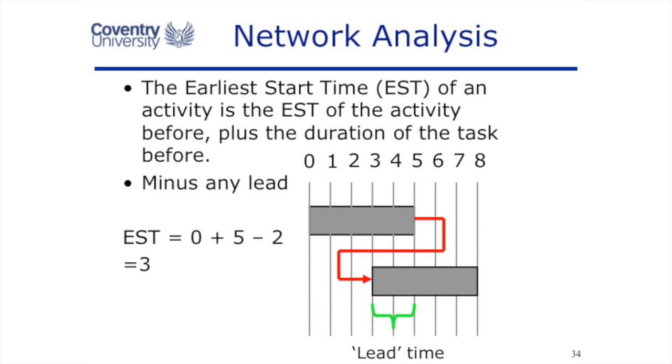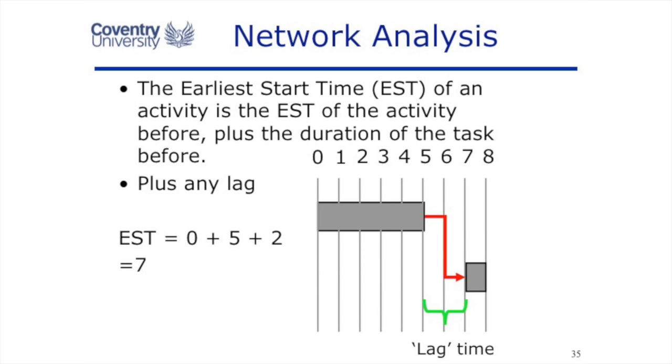However, when we do this, we have to remember that we have to subtract any lead time because the second task can start before the first task is finished, or we need to add any lag time. So the early starting time of an activity is the early starting time of the activity before it plus the duration of the activity before it plus any lag or minus any lead.